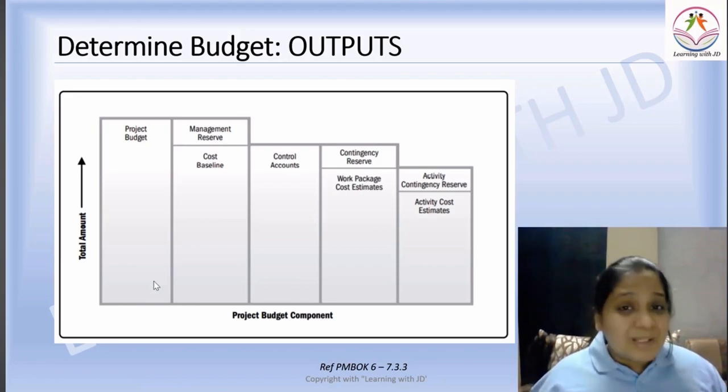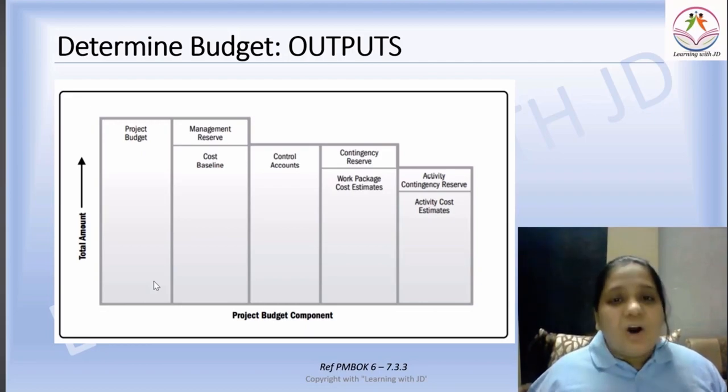Remember, this can be a 1 mark question for you in your examination as to whether management reserves is a part of the project budget or cost baseline. Okay, so it's a part of the project budget and not a part of the cost baseline.